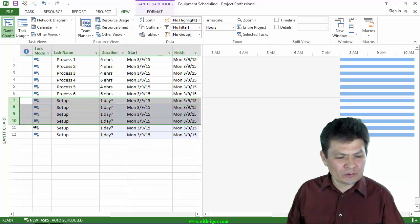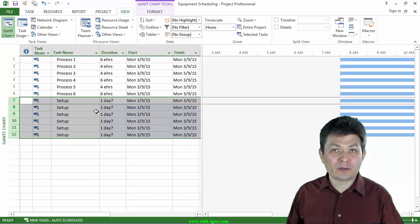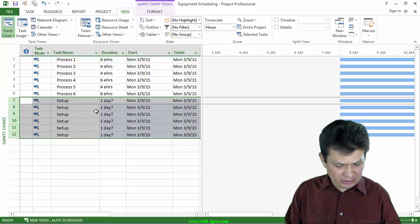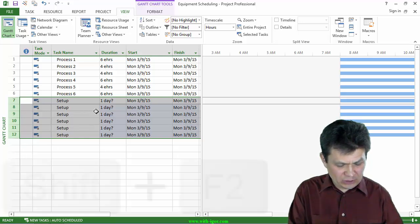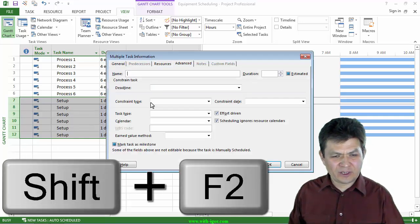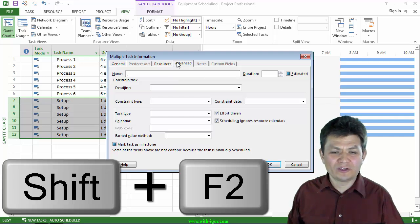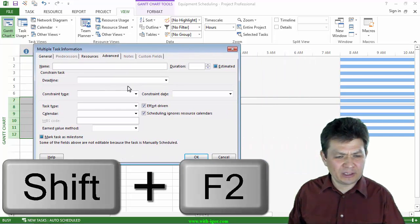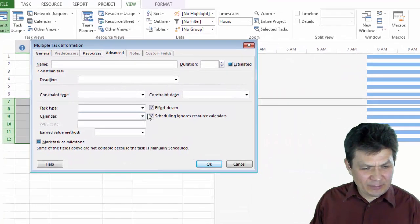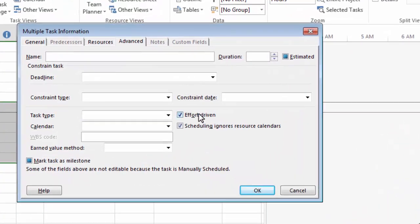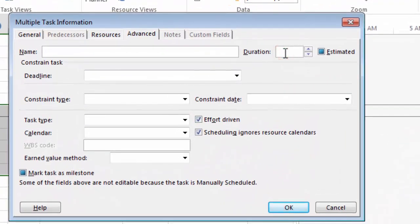Now what I want to do, I want to select them and I want to make them all, for example, one hour in duration. So I'm going to select and do Shift F2, task information dialog box or multiple task information dialog box. I'm going to make it, first of all, I'm going to make it one hour. And of course, you can make it smaller than that. It depends on how long your setup is.